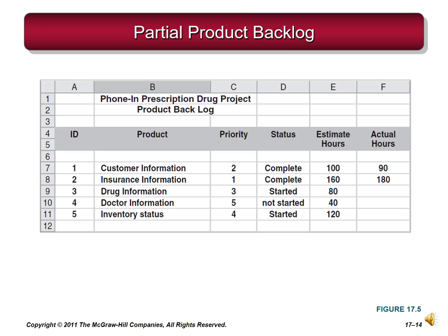Each project has a product backlog and a sprint backlog. The product owner controls the product backlog and the team controls the sprint backlog. The product backlog is the customer's prioritized list of key features desired when the project is completed. Only the product owner can change the product backlog and its priorities.